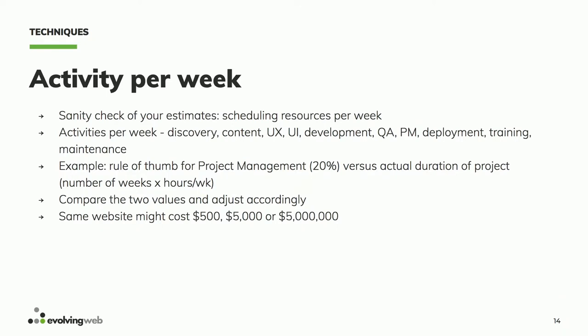Oh, yeah. So we want to point out that in addition to top-down and bottom-up, there are different ways of doing bottom-up. There could be a list of deliverables, but equally valuable to me is my staffing profile for the schedule and how many people will be working per week, per task, per category of people. So include your major deliverables and milestones, but then for each one, list each category of resource, and don't forget to include project management, of course, and say for all of those things, here's what this given person will be doing that week.